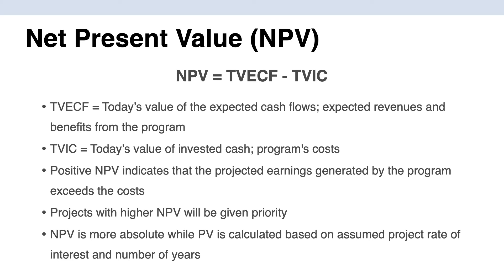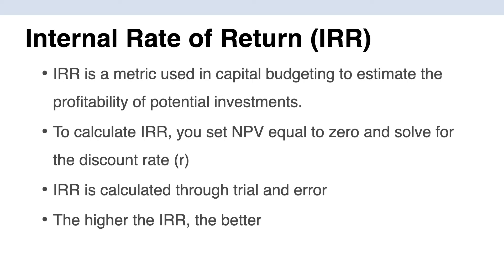From present value we can calculate Net Present Value. NPV is today's value of expected cash flows — all expected revenues — minus today's value of invested cash, which is all costs related to your program. We project how much money we'll earn in the future versus when costs will be incurred, and discount everything into today's dollars. If NPV is positive, the program earns money; if negative, it loses money. We prioritize projects with higher NPV. NPV is more absolute, while PV is calculated based on an assumed interest rate and number of projection years.